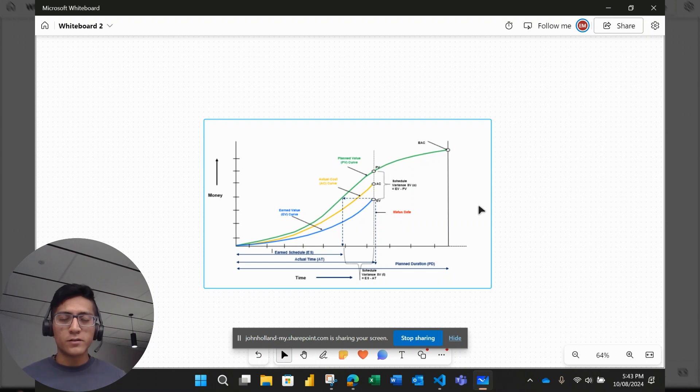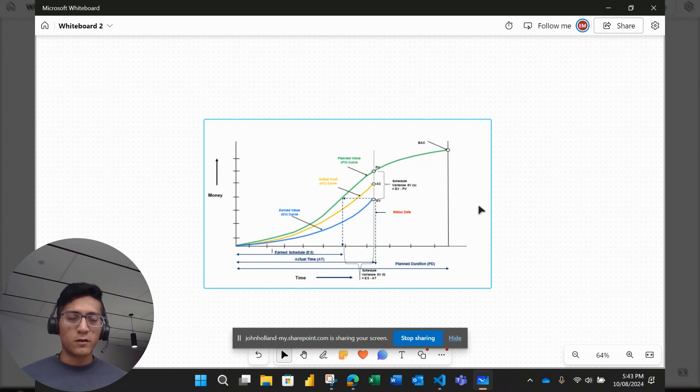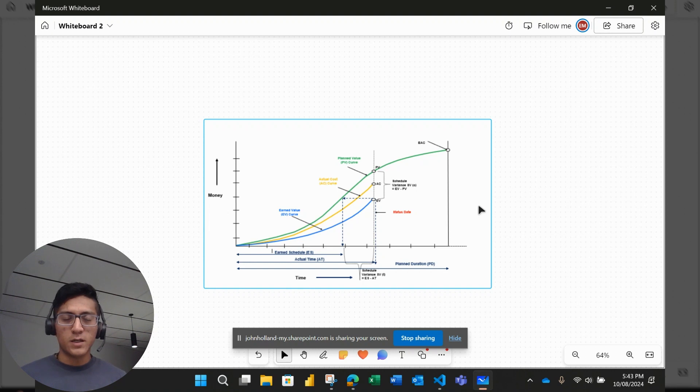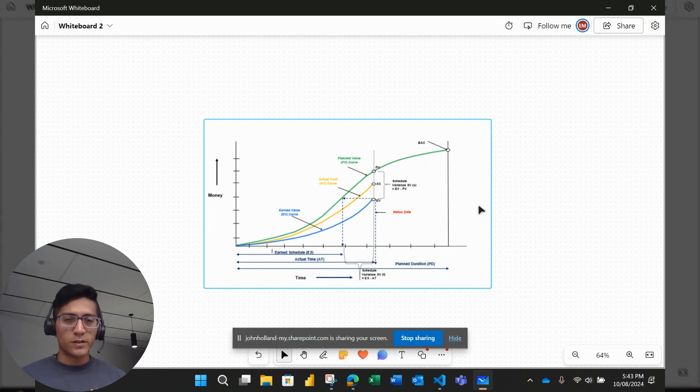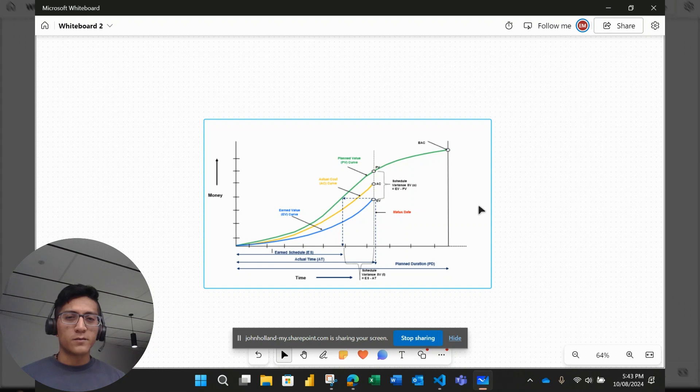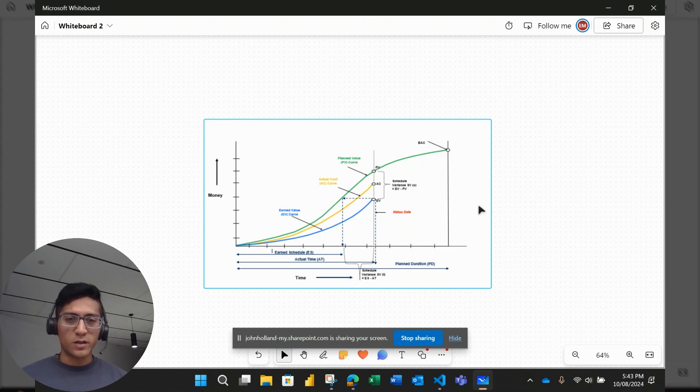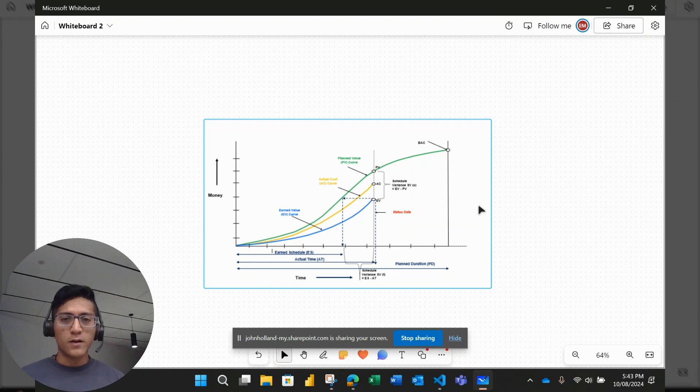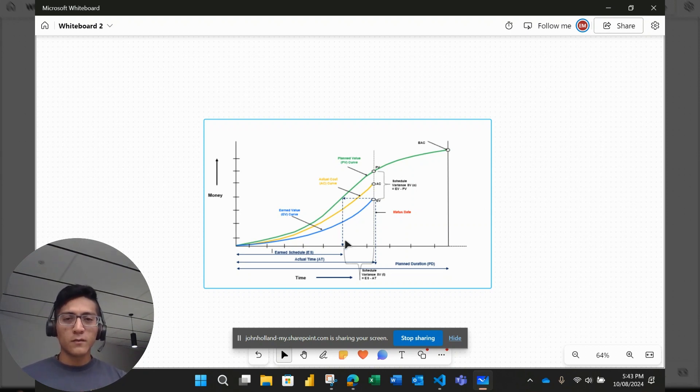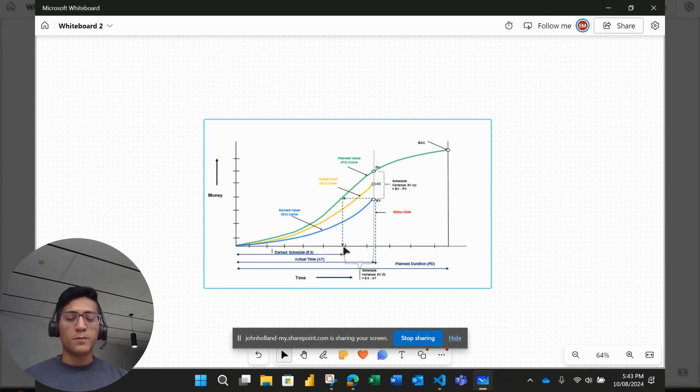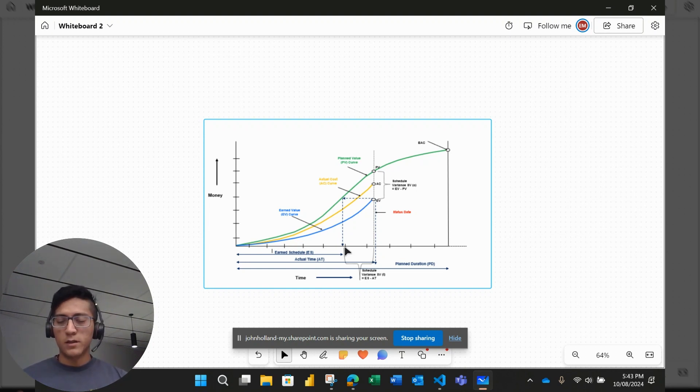We're going to refresh to previous videos. So this is the curve of the earned value matrix, and we're going to talk about this again in a few minutes, but earned value is basically made a projection, horizontal projection, into the planned value curve, and then going vertically down to find out which is the period in which that earned value should be earned.